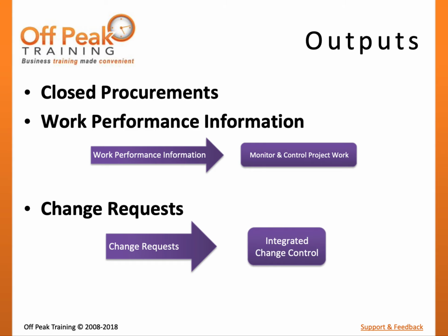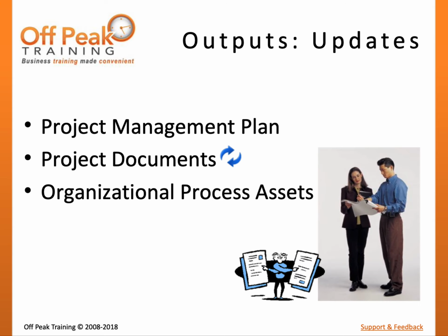As the agreements themselves change or the seller's performance changes, the project baselines will need to be updated to reflect those changes. To help ensure changes are properly integrated and all baselines are updated, it is important to follow change control procedures by generating change requests. Like all change requests, these will become an input to the Perform integrated change control process. The control procurements process may also create additional project documentation and updates. This may include updating the procurement management plan, the stakeholder register, or the agreements.